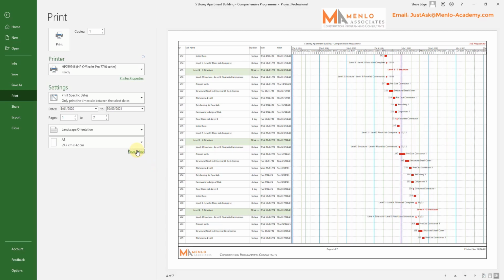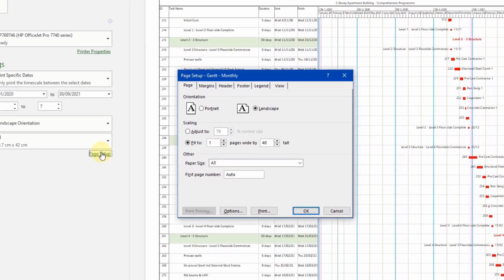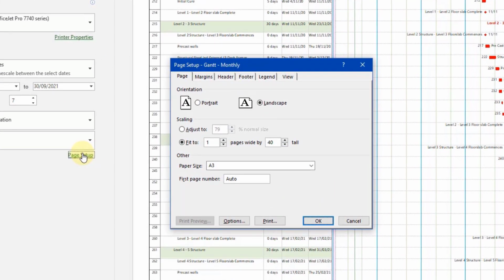And the way I would normally set up the number of pages is on an A3 sheet, 50 to 60 lines can be read quite comfortably. So if a program is, say, 1200 lines long, then basically 1200 divided by 50 is 24 pages, and 600 lines at 60 lines is 10 pages, so 20 pages would be a general comfortable read.